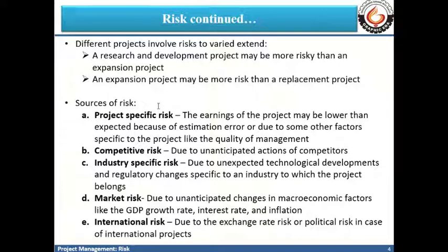Now, there are many sources because of which risk may arise, though they are categorized into some different categories. One is the project specific risk, and this is when the earnings of the project may be lower than expected because of errors in the estimations which you have done.